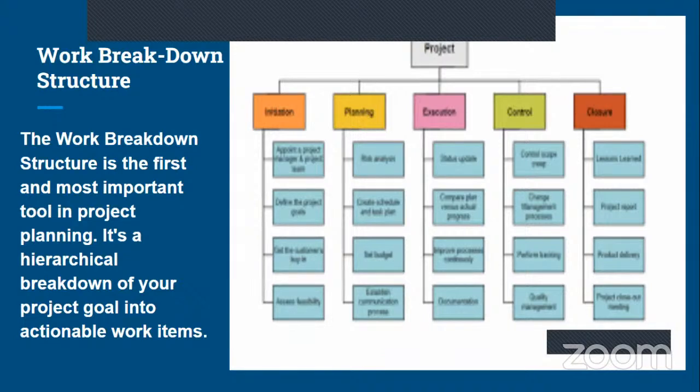Then you can break each of those tasks down into deliverables that you assign to each of your team members. As they complete them, you'll know who is assigned to which, and this work breakdown structure helps you know what has been done.